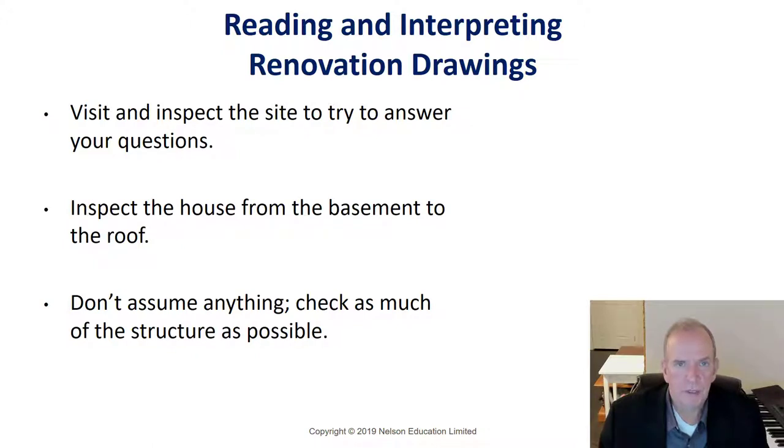And I would definitely photograph everything with your cell phone as you go in and you're walking around, so you can always reference that later on too. And you might want to do a little bit of investigative work and ask yourself a series of questions. Things like, what is the existing wiring on the house? You know, older houses, they might have knob and tube wiring, they might have aluminum wiring. There's a whole bunch of things that you'd want to have checked out.